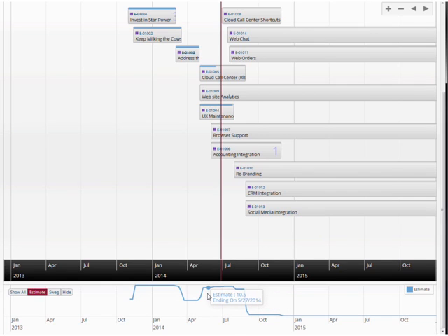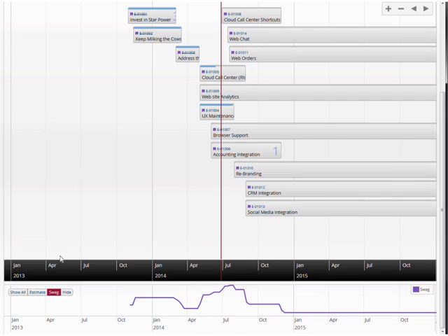Sometimes you will see dips like this, especially if you are ramping up new teams or making some other organizational change. There'll be a dip in some number just as an effect of making the change, as it'll take the teams a little while to get back into the swing of things, especially if you're creating new teams. So you may look historically, and if you know that you've had an event like this and you see the dip, then you should be looking for an improvement moving forward.